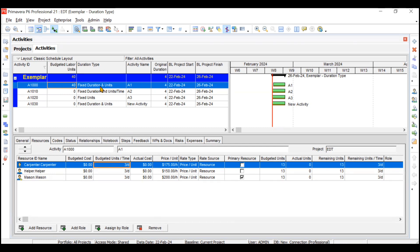This means this activity is very much time-constrained. You should only assign the duration type as Fixed Duration and Units to activities for which you cannot change the duration — even if you add many resources, the duration should not change. It cannot go from four days to two or six days, meaning the activity is not dependent on your resources at all. Your schedule is very constrained and your units are also very constrained — the activity must be completed in the fixed schedule with fixed man-hours.